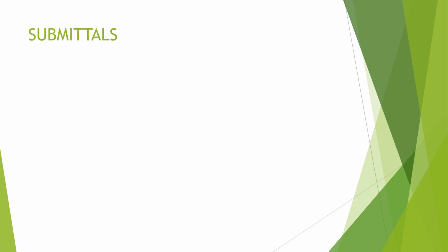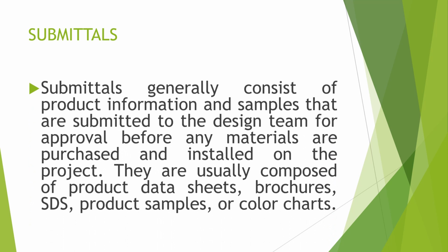Submittals. Submittals generally consist of product information and samples that are submitted to the design team for approval before any materials are purchased and installed on the project. They are usually composed of product data sheets, brochures, product samples, or color charts.